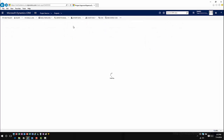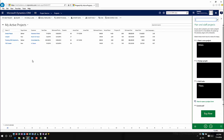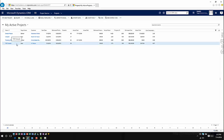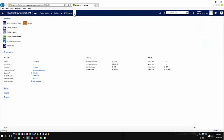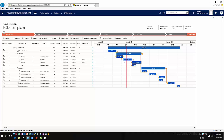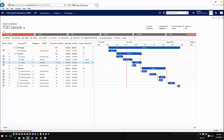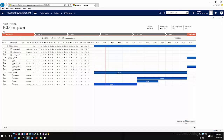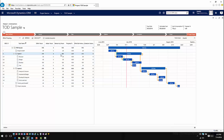Now if I go back into project service and back into my projects, I can start to see what's taking place. Within my tip of the day sample project, I can see what type of progress we've started to make. I could go into my work breakdown structure and start to see that some time has been built against individual tasks — how much time has been taking place from that scenario. I could also look at project tracking and see exactly what's happening there: actual hours built towards this project, remaining hours, percentage progress, all rolled up to a project level. This is where you can really start to manage this on a day-to-day basis.